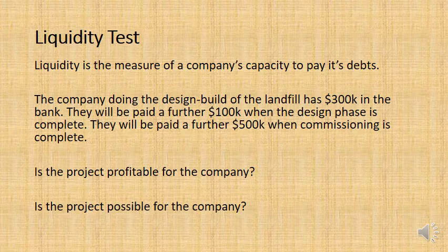Well, that's pretty clear, isn't it? Our revenue will be $600,000 and the expense will be $497,000. That means we will make $103,000 profit in just 20 weeks. It sounds like a pretty good project. We should probably do it, right?